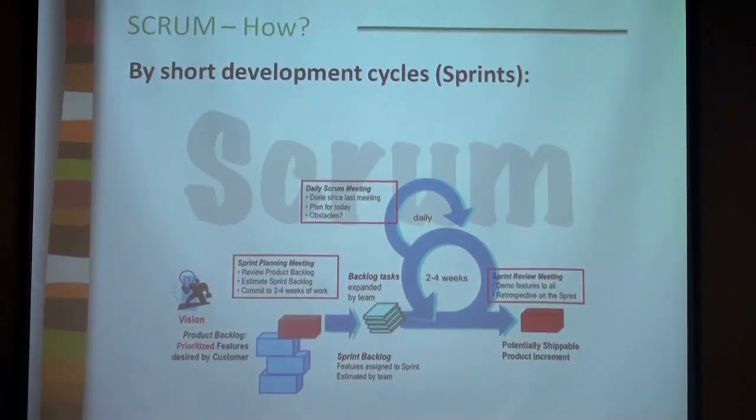So that's why people usually tend to have 4 weeks, like every month, right? From, let's say, Monday to Monday, you have one sprint. The first Monday of this month and the first Monday of next month, you have one sprint. It also psychologically disciplines people, right? Because development knows, okay, I have to deliver. Unless I deliver, I will be late.